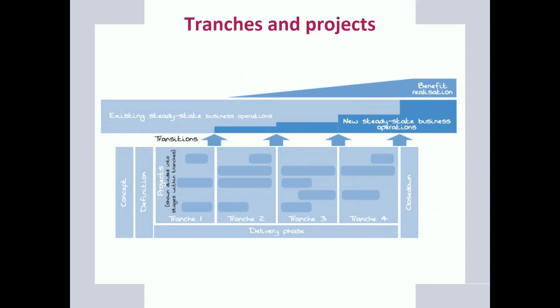And if you look at the ramp on the top of the slide, the benefits realization, just dropping one tranche of pieces into the business as usual organization, i.e. the steps on the next level down, that itself doesn't deliver the benefit, it delivers the enablers of benefit. The benefits are only realized over time as the change that is being delivered then gets rolled out, realized and exercised in the business as usual activities.